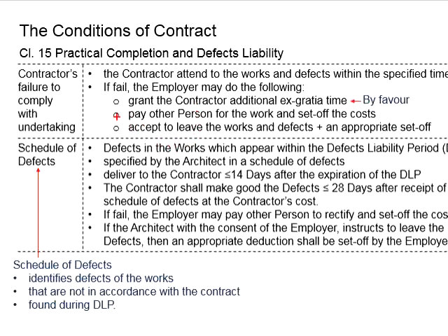Or the employer may accept the work as it is, that means the work is with defects, but there will be a cost offset from the payments to the contractor. Or the employer can choose to extend the time given to the contractor, insisting that the contractor rectify it.